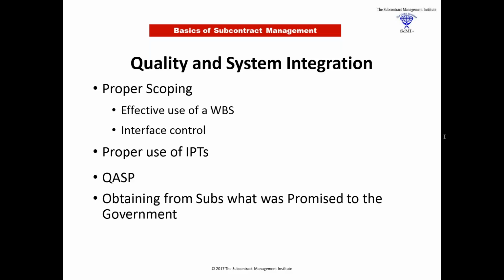If you enter into an agreement, going back to that very first definition on the earlier charts, a consultant who is contributing to the final product is a subcontractor. The form of the agreement, the nature of the work, the nature of the services is no different. Now, you blended in your question subcontractor slash subgrantee. Now, FAR does not apply to grants. I want to emphasize that.